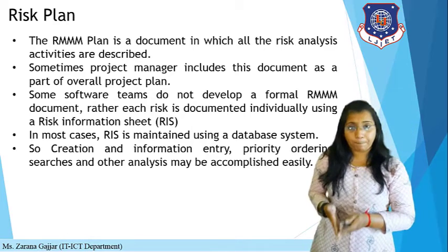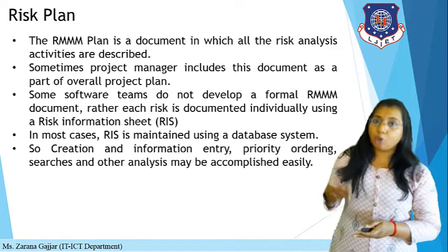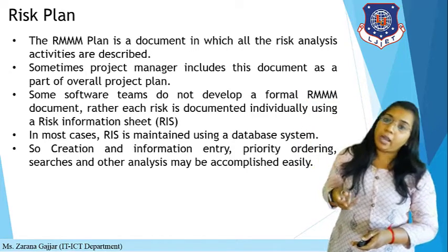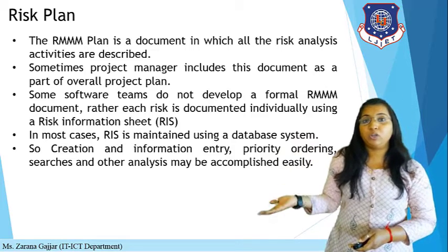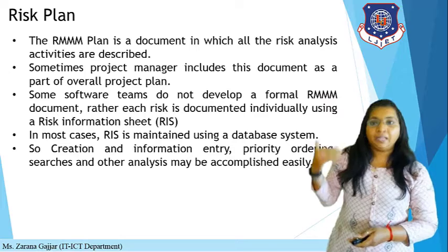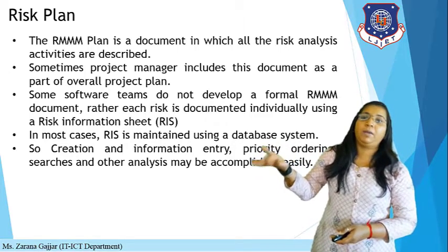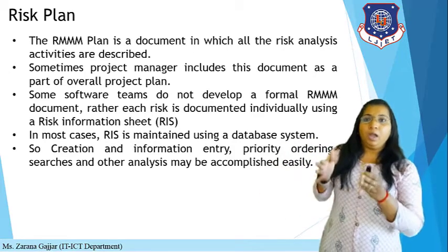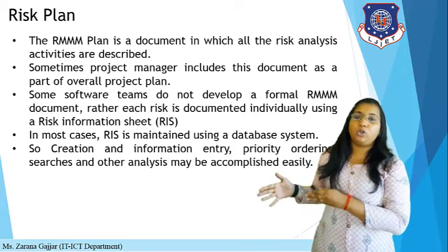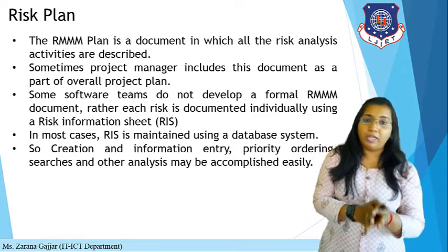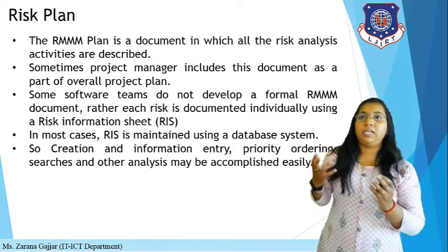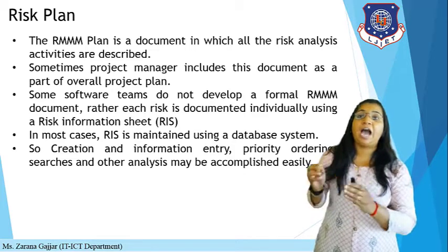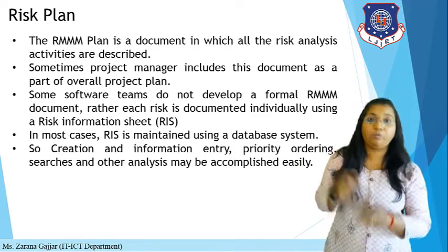Now what do we mean by a risk plan? The RMMM plan is a kind of document in which all the risk analysis activities are described. Sometimes the project manager includes this document as part of the overall project plan, and some software teams do not develop a formal RMMM document. Rather, each risk is documented individually using a RIS. If the project manager includes this document in the project plan, then it is easy to manage. But sometimes some software teams do not develop a formal document, and they individually use a RIS, that is the risk information sheet, from their side only.